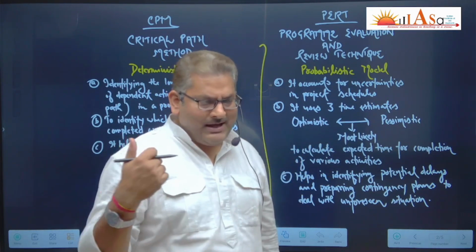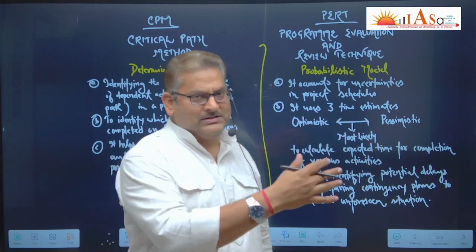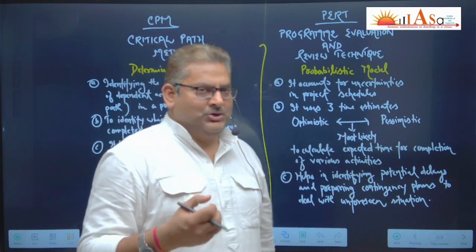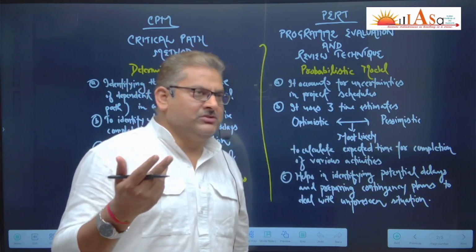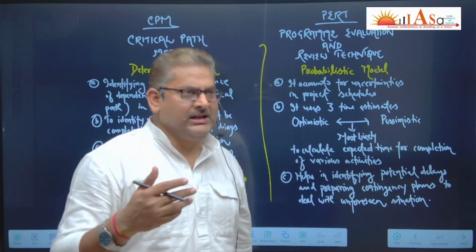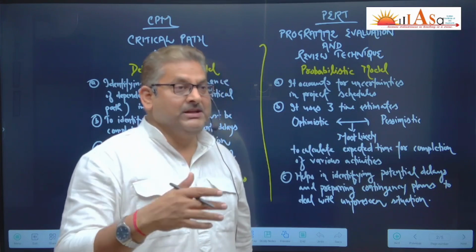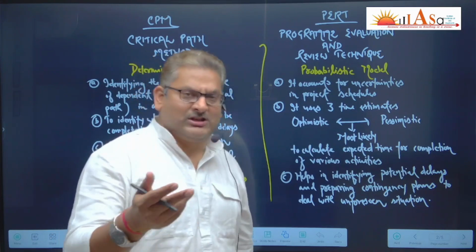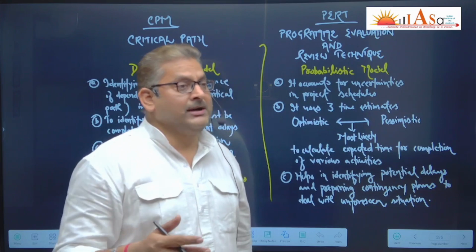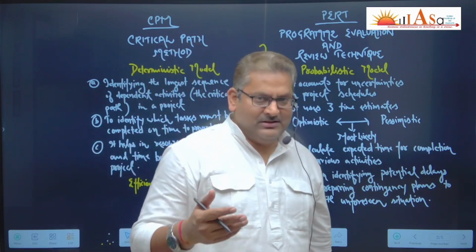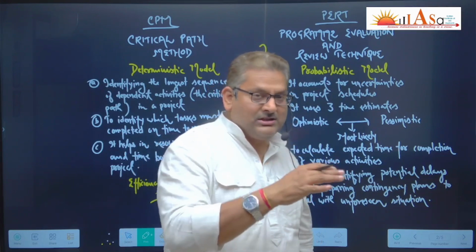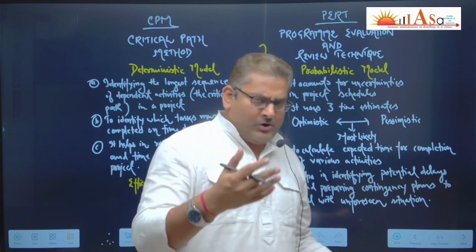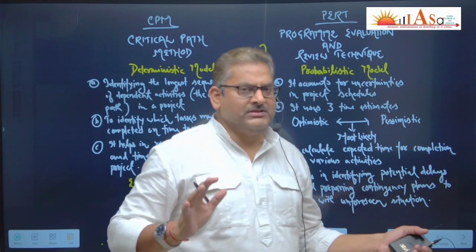So you make an estimate, and you take into account uncertainties, like there can be a change of guard or political leadership. I would say there can be political changes, environmental changes, some kind of natural calamities, or some kind of public protest, agitation, or workers' labor strikes, something like that. You take into account those uncertainties, accommodate those things, and then you come up with the estimate.